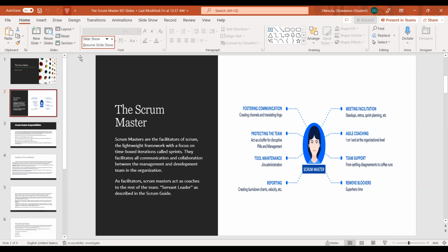So if this particular developer is the only developer that can work on that product, definitely there might be an issue, so the Scrum Master might want to ensure that we don't encounter what we call the single point of failure. So before that person gets to that time of making that baby, the Scrum Master wants to ensure that he creates and organizes a class, right? So we call it knowledge transfer. So it brings up another person, then this developer tutors or teaches the knowledge to this person to carry out that responsibility, so that when she is away, another person can step into her shoes and deliver these deliverables. So that's that basically.